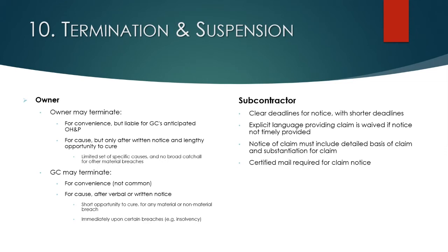Are you entitled to recover that? And if the owner terminates you, or even if you terminate, does the owner have to pay you right away? Or can the owner, if the owner owes you money, hold that money and keep it till the end of the project and set off any amounts that the owner incurred to finish the project? Of course, you would want the owner to be obligated to pay you right away and not withhold monies.